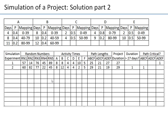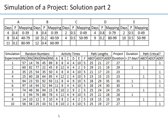We repeat for the remaining eight experiments. Across all 10 experiments, project duration varies. In four cases out of ten, we exceeded 27 days — with durations of 29, 35, 30, and 28. We also note how many times each path was critical, and there was even a case where two paths were simultaneously critical — both A→B→C→F and A→D→E→F at 23 days.